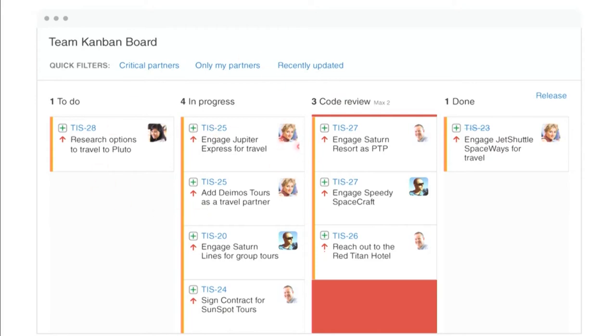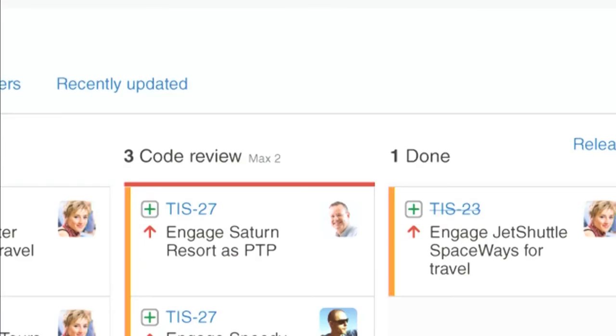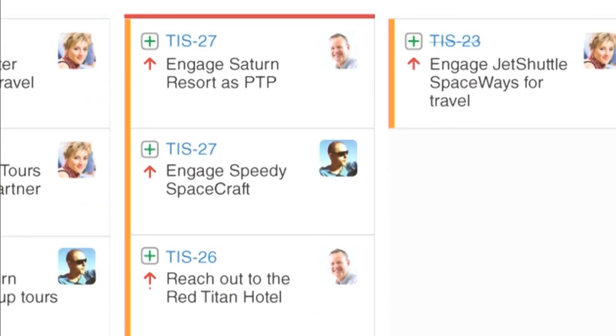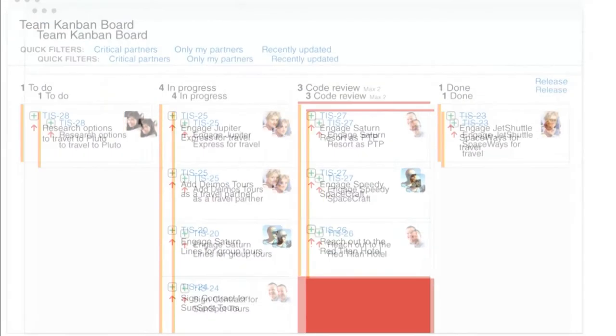Here is a digital Kanban board with four columns: To Do, In Progress, Code Review, and Done. You can see a red color indicator on the Code Review column. The maximum number of tasks permitted in Code Review is 2, but there are 3 tasks there. The red color is a sign of risk — a potential bottleneck or impediment. This triggers action: why are there 3 tasks in code review? We need to improve the system so the flow doesn't break and remains continuous.